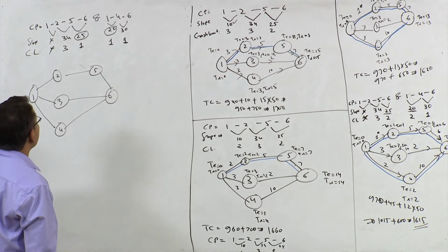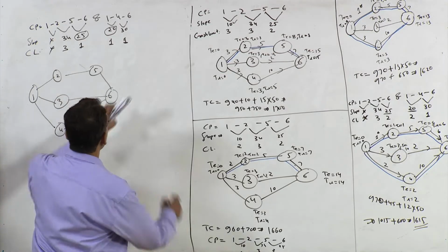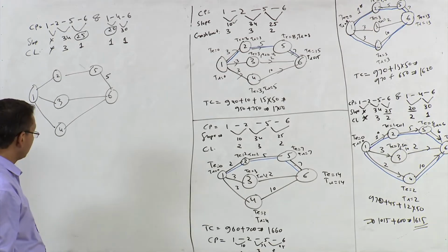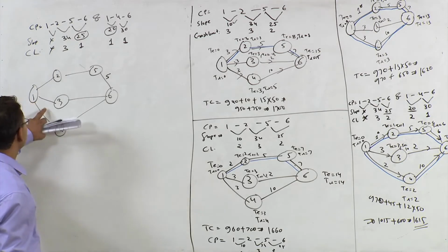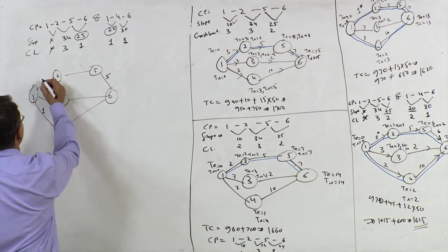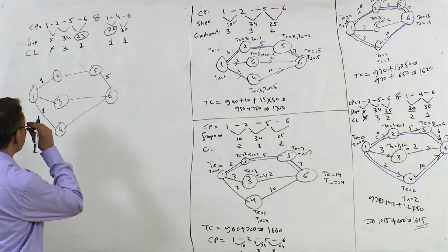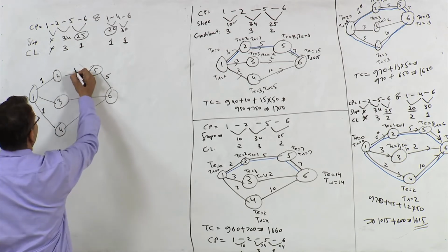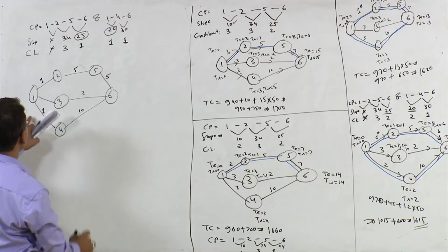We have to reduce duration of activity 5, 6. 5, 6 is this, right. Now this duration will become 5, and activity of 1, 4. 1, 4 is this. Now this will become 1. All others will remain same, right. So this is 1. In fact, now the other durations will remain same. So this is 5, this is 2, this is 10, right, and this is 3.